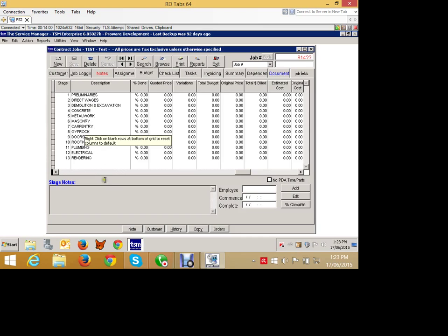Each of those are stages that are broken down. They're typically done by different contractors. They're typically quoted for separately. The costs need to be tracked independently, but they all add up together to be an overall project that needs to be managed cost-wise. So there are some standard stages for installation works that our clients go through. This one is for building, but for example, for air conditioning, you may have rough-ins, you may have fit-outs, you may have all different stages.